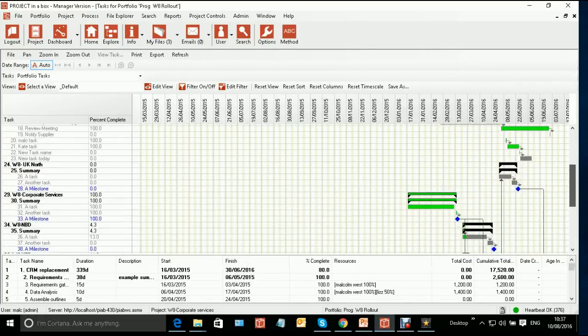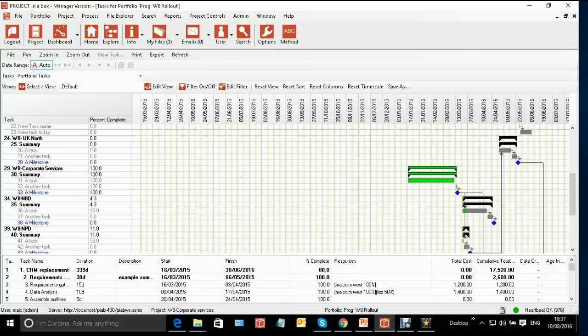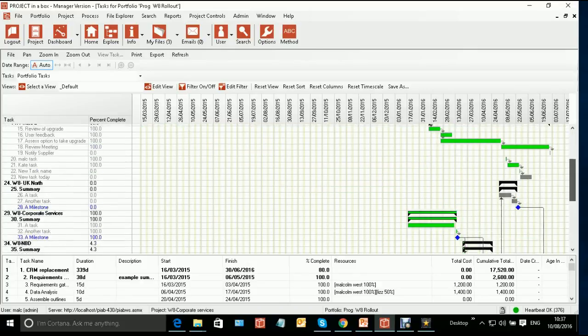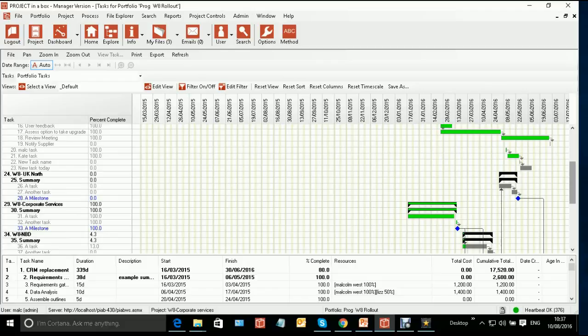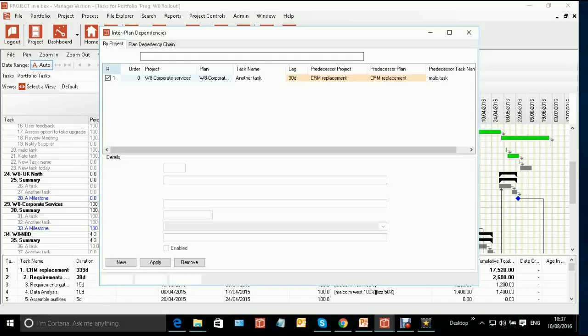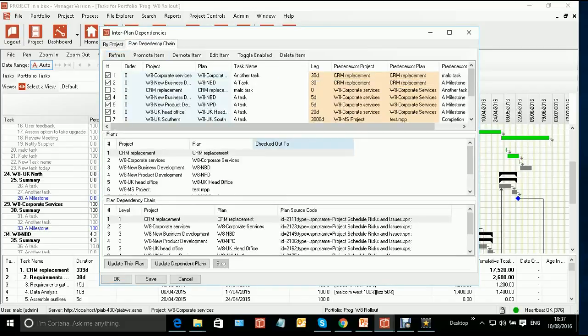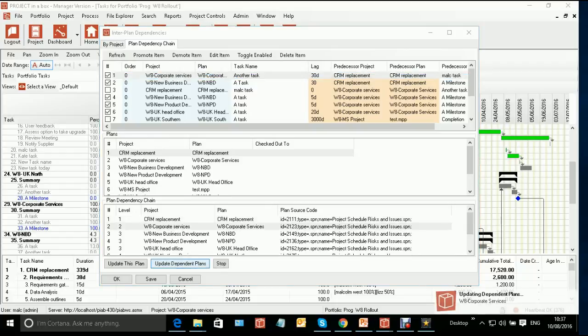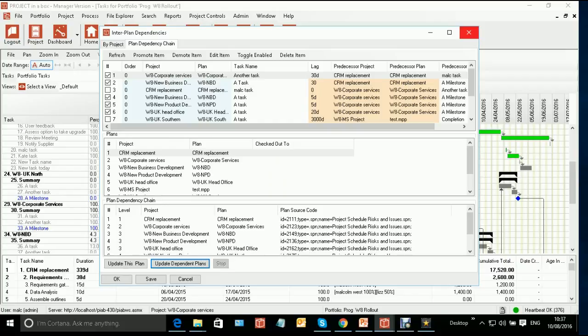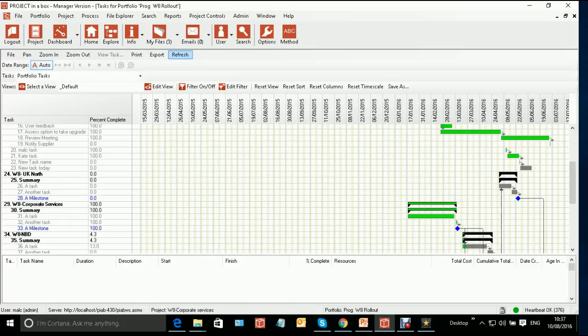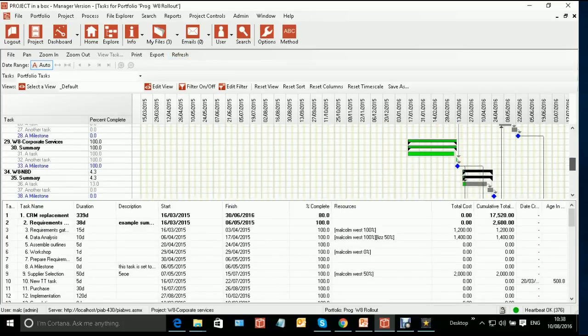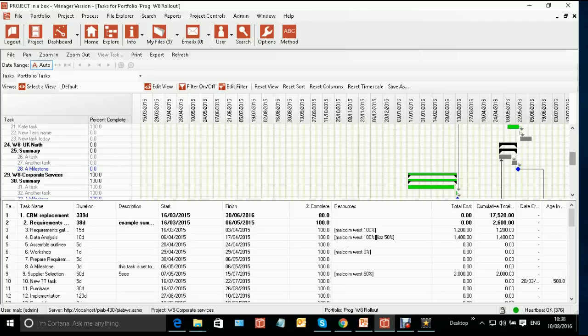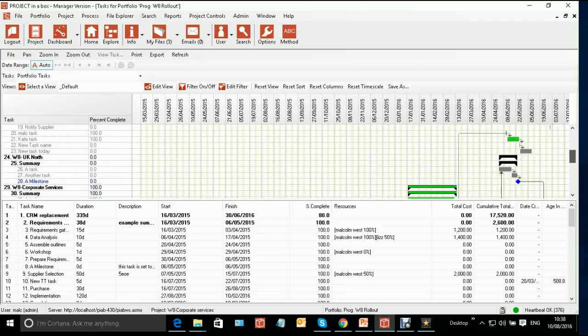And we'll be able to see our corporate services plan. Now, if I want to go back, I could now check this one out and progress through the chain. But if I go back to my admin, managed plan dependencies chain, I can now see I've got nothing in the way of that. So if I come to here and update dependent plans, see down here, it's rolling down through the various plans that it needs to and updating all of those for me, based on the first one we've set up. If I now come back and refresh this, we can see we've had this one move along a little bit and we moved everything else accordingly.